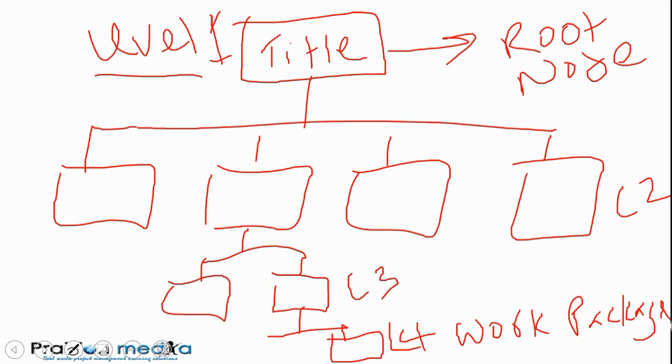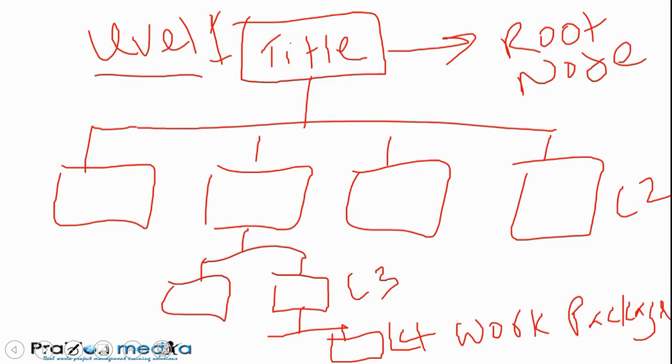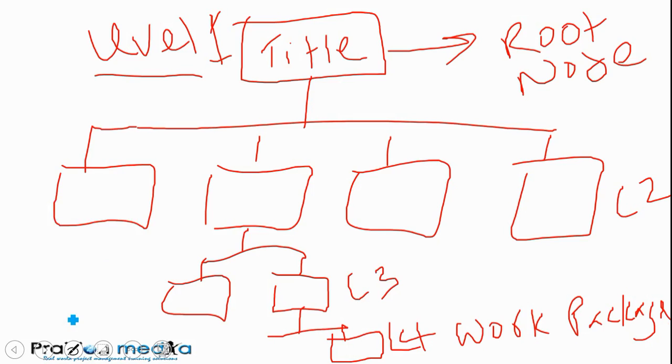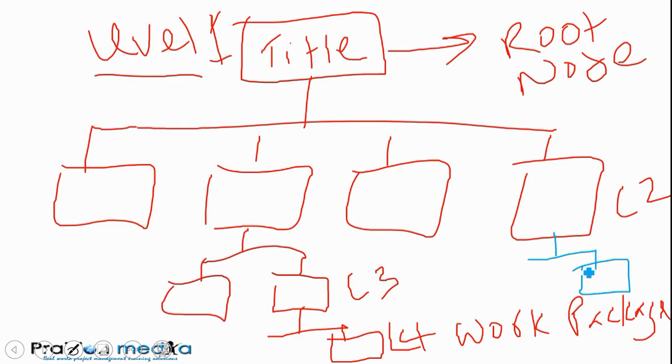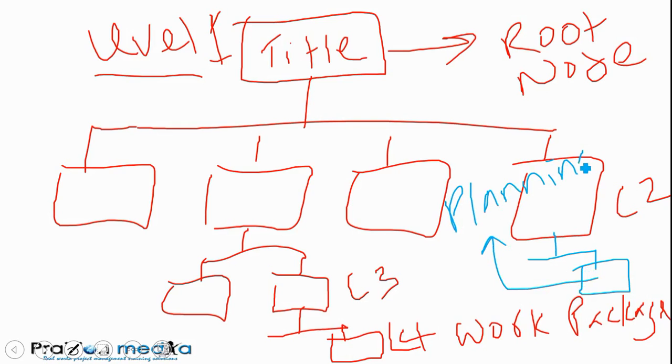One more thing to talk about in the work breakdown structure is another type of package known as a planning package. A planning package is a work breakdown structure component with known work content which has not been decomposed. It will be decomposed as you near the time that the work is going to be carried out. We put the work into a package such as this.